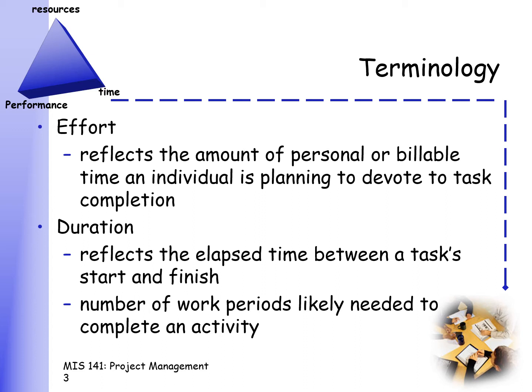Now, if the person says, I will just give 50% effort, then that 4 days doubles. You can say that now it will take 8 days, assuming that the ratio is proportional. So, effort comes from the individual, the amount of time that he's willing to spend. Duration really is time.